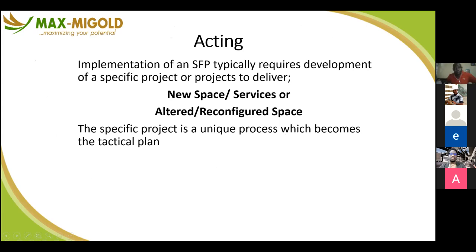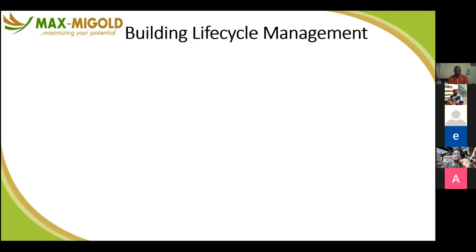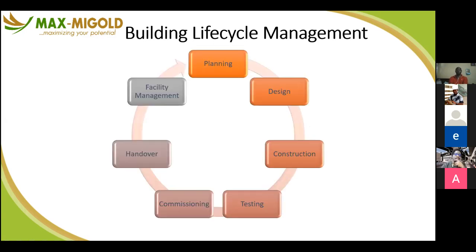And then of course I implement the SFP by developing certain projects to either create new space, provide new services, alter or configure space, or alter or configure my services. It is at the acting stage that I'm now beginning to implement what we have agreed on or signed off at the strategic planning. A facility will typically go through this process: planning, design, construction, testing, commissioning, handover into facility management.